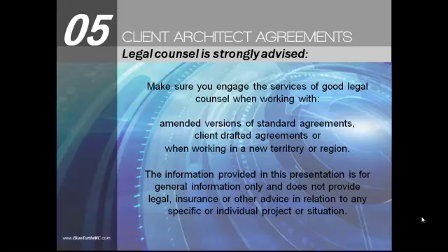While working in Texas, I helped manage a project that experienced client payment issues, and unfortunately I had the very undesirable task of settling the subcontractor accounts. Now, if this project had been located in California, the financial outcome would have probably been very different for all parties, especially us as the builder.